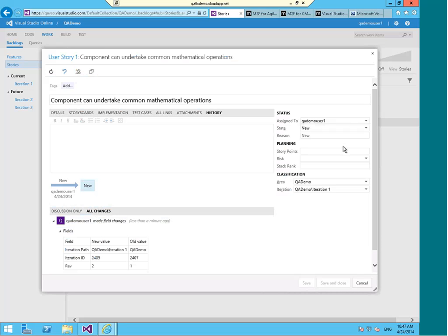Well, that's fine. We have some user stories. In this case, of course, we have just one, but we have some user stories. And now what we need to do is think about how might we actually implement that user story. And this typically may well not be the job of a business analyst. This might be more a job for someone like a project manager or someone like a technical lead, actually sitting down with the development team and deciding what actually needs to happen in order for us to complete that requirement, to complete that user story.